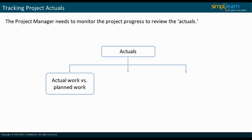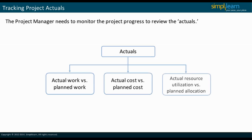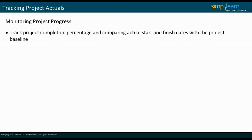The term actuals refers to the actual work that has been done compared to the planned work, the actual cost versus the planned cost, and actual resource utilization versus planned allocation. A project's progress can be monitored by tracking the project completion percentage and comparing the actual start and finish dates with the project baseline.